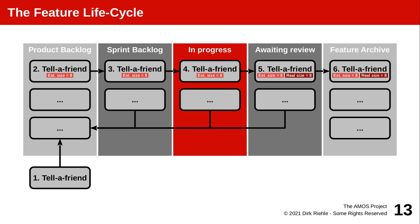At any stage during a sprint — specifically at the end of the sprint — the feature may not pass review, or it may still be in progress, or it wasn't even started. Then it's moved back into the product backlog for new scheduling again in the upcoming sprint planning meeting. So there are seven stages for feature requests as they go from being just an idea to having been implemented and documented.